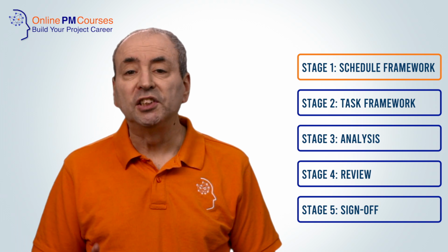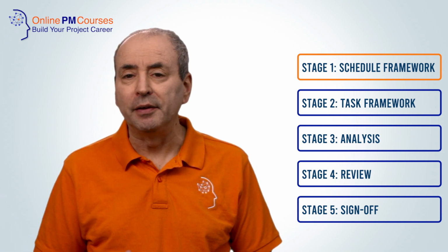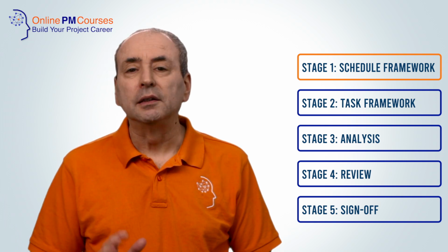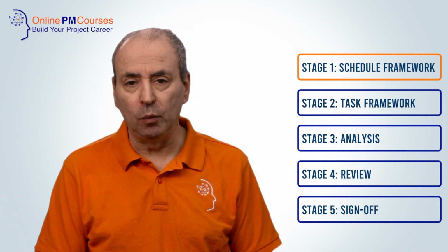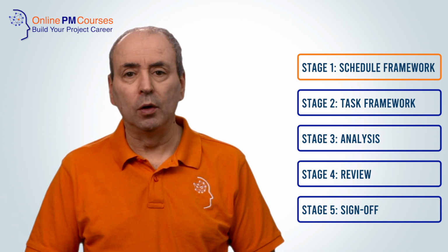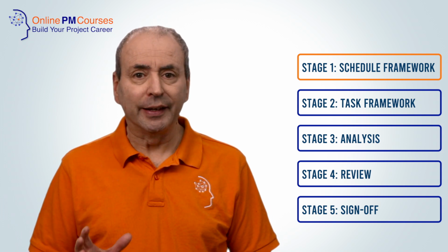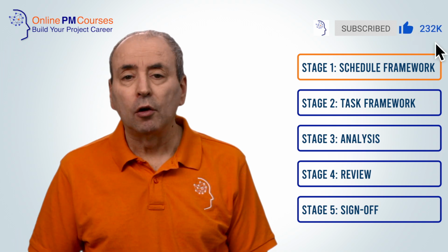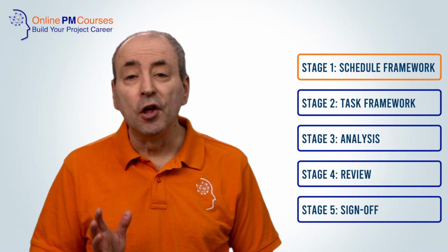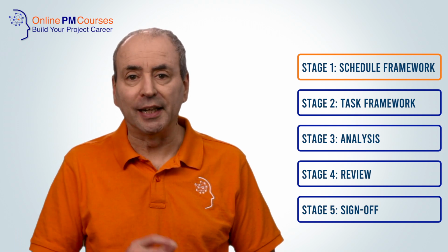Step 5, consider the number of working hours for each day, and this may be different for different days. Some organisations have shorter working days for the last working day of the week. And remember, if you've got non-working days in the week, as hopefully we all have, then you need to allocate 0 hours to those days. Critically, don't forget that the non-working days may be different in different regions and locations.